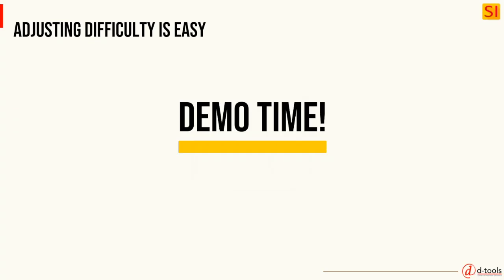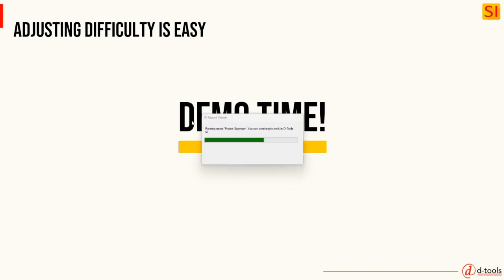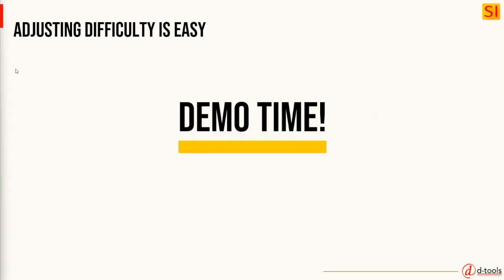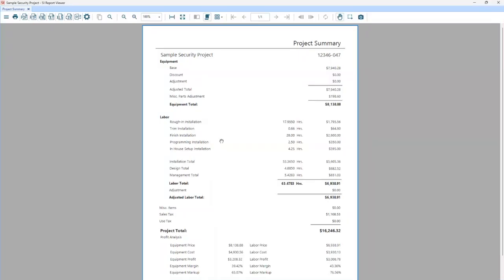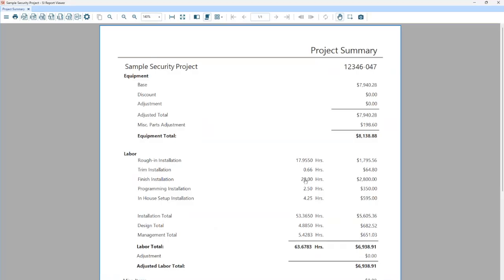And I can look at those budgets. We'll look at those budgets, and sometimes we might just immediately say, well, if I look at, for instance, that finish at 28 hours, maybe I immediately recognize it's too low and I want a different number, right? Let's say I'm going to send 2 technicians out for 28 hours. That's really 14 hours per tech. So that's not quite 2 days. So even just from a very practical standpoint, I might simply want to adjust this budget to 32 hours so that I actually get 16 hours for 2 days, right, for 2 technicians.